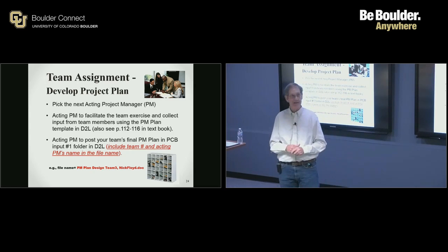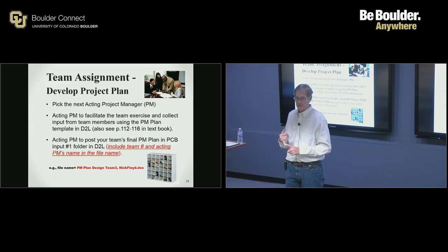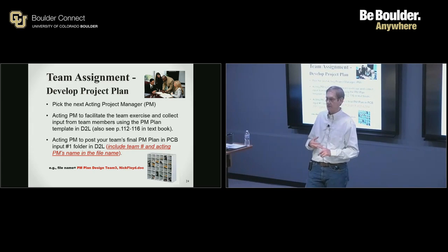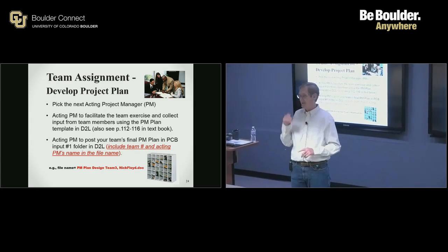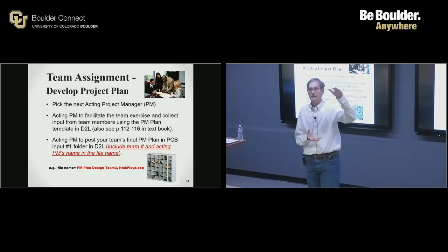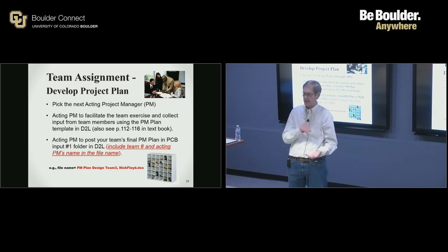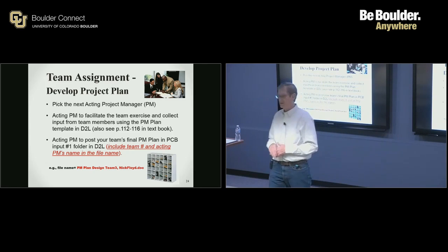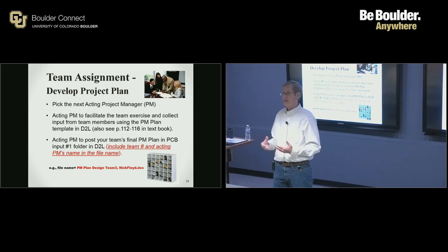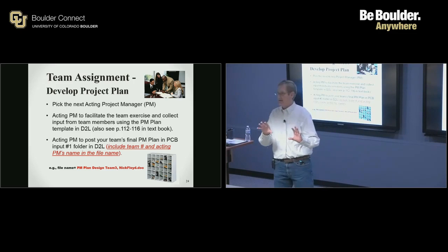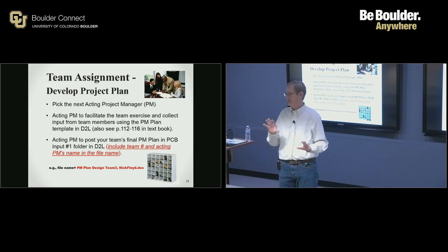Activities that we're going to start talking about next week are things like identifying the number of volunteers required, how we're going to train the volunteers, how we're going to schedule the volunteers, feed them, things like that. So a category of work might be developing a volunteer management plan. We manage the volunteers, we manage our architect on the design teams. The goal going into next week is really to figure out how we're going to break this project up into manageable chunks, manageable categories. Maybe it's plan the event, conduct the event, and then clean up after. That's what we're going to focus on next week.